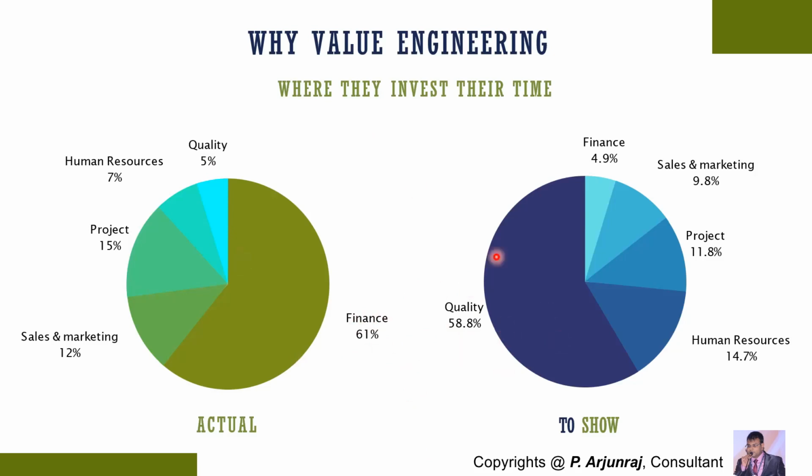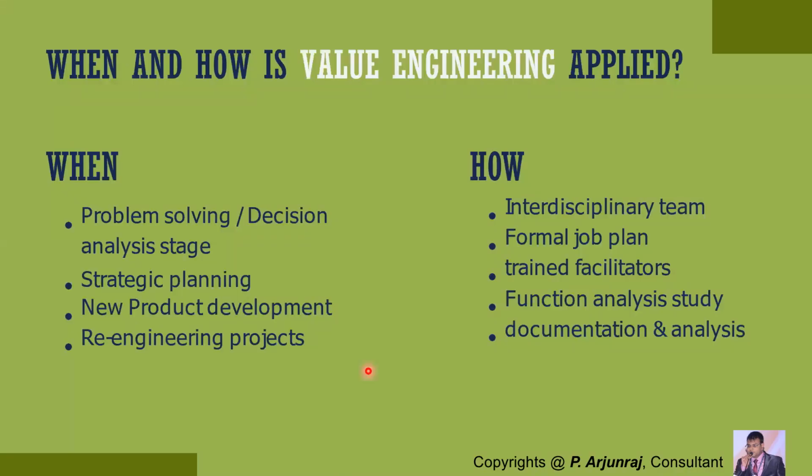You need to understand the technique of how you are going to convert the cost into the requirements, and when and how you are going to apply value engineering. You apply value engineering for problem solving and decision analysis, using cross-functional team members, through a workshop or formal job plan. You can also apply it in strategic planning for your company, using a trained facilitator. For new product development, you can apply it using a requirement analysis study.